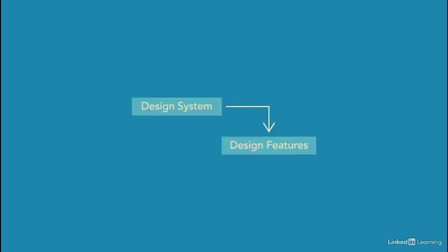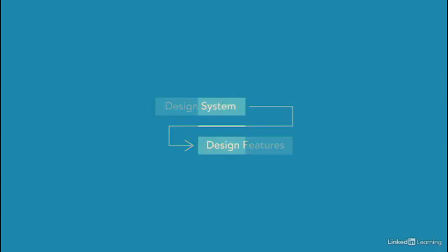Fast tracking means you overlap tasks that normally occur one after the other. Let's say you want to finish design more quickly. You can have some folks start designing software features before the system design is complete. Fast tracking is simple. You just add an overlap to two tasks with finish-to-start dependencies.